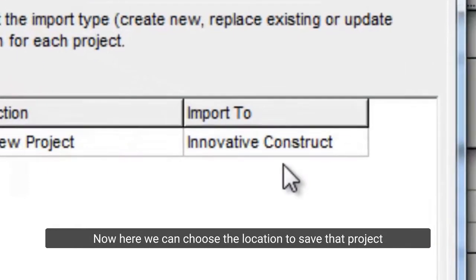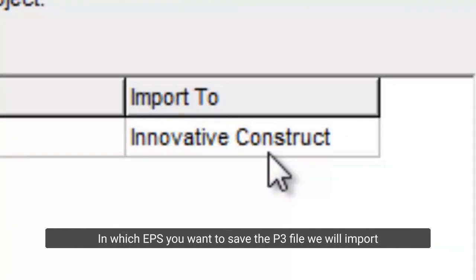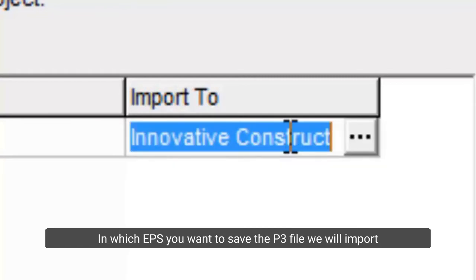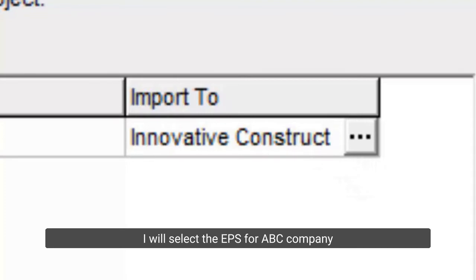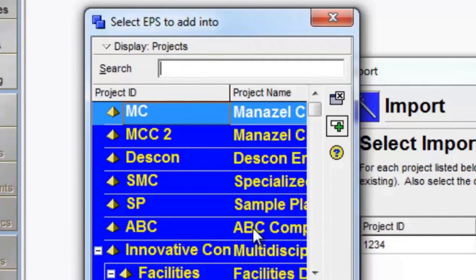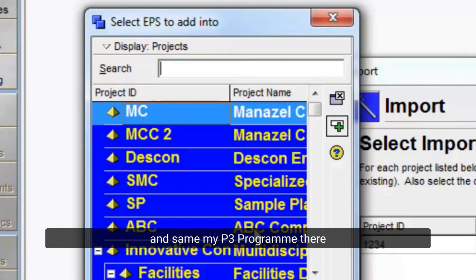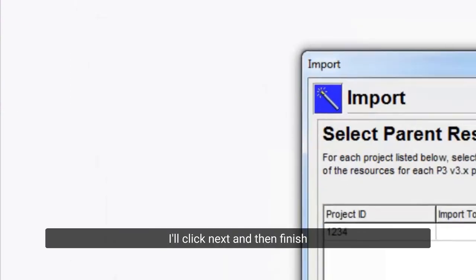Now here we can choose the location to save that project — in which EPS you want to save the P3 file we will import. I will select the EPS for ABC Company and save my P3 program there. I'll click next and then finish.